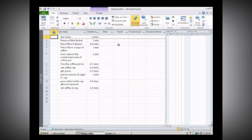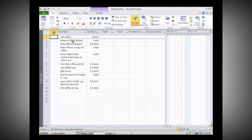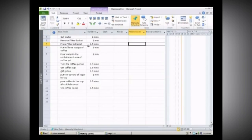We're going to say that we have two resources: Pam and Charles. They are going to work together to make a pot of coffee. The first thing is to identify our related activities. If we look at these activities, we can get water and we can remove the filter basket, and we could do that simultaneously — so those are parallel activities. Since we have two resources, those could both be starting activities.